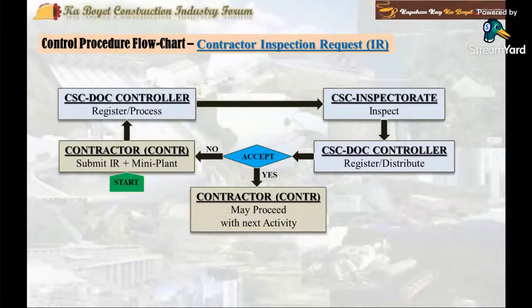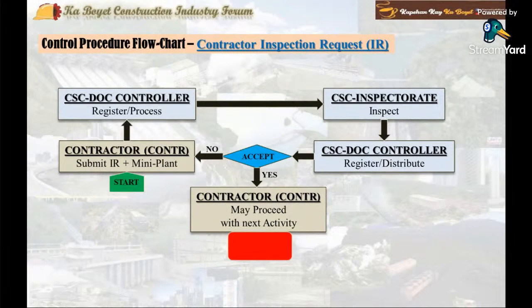Step 9, the contractor and consultant should maintain an updated IR log registry. And step 10, contractor shall issue an updated weekly IR summary report to the architect, engineer, the consultant, the designer, and the QS consultant. At this note, the IR control process ends.